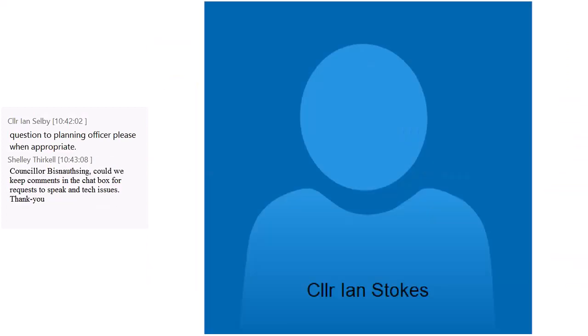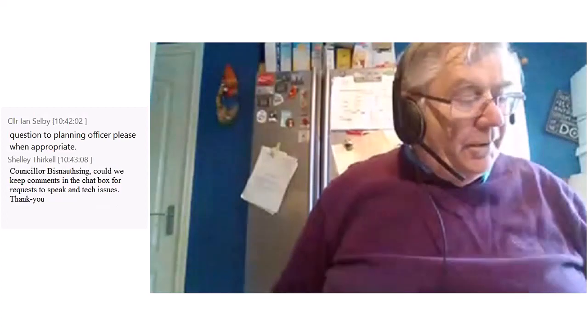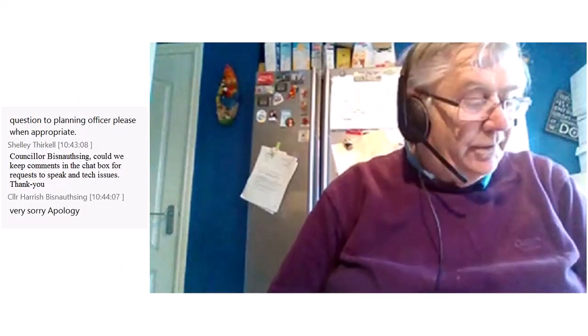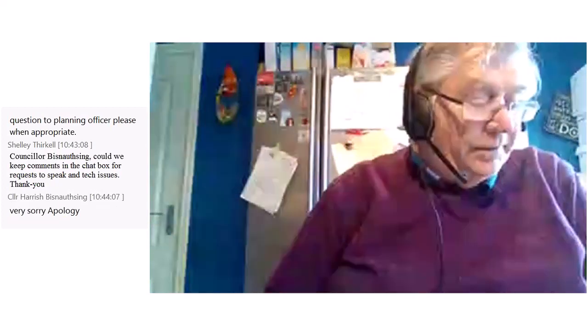Thanks, Ian. Yes, I'm a little bit puzzled by this, really, because on the 19th of January 2018, the inspector allowed the appeal, see 3.4 on page 10, and the permission had condition 3, see 7.1.2 on page 13. Any reserved matters application had to be submitted within 3 years of the date of the outline permission. Would you note that the amended plans were submitted according to the officer's brief in January 2021, see 3.9, page 11. Was this actually within the time frame prior to the 19th? And why was the actual date not mentioned?